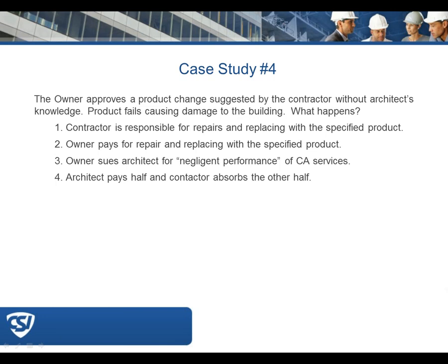Well, again, the purpose of this, and I think we're getting some good comments, some good feedback here, is just to point out these different scenarios. Everyone that we've talked about so far, I've seen happen on a job at one time or another. And it goes back to the risk management discussion we had last time: what do you need to do to help limit your exposure for these types of conditions, and making sure you follow the procedures that you put in the documents. A substitution request submitted by a contractor is not a change to the contract documents.